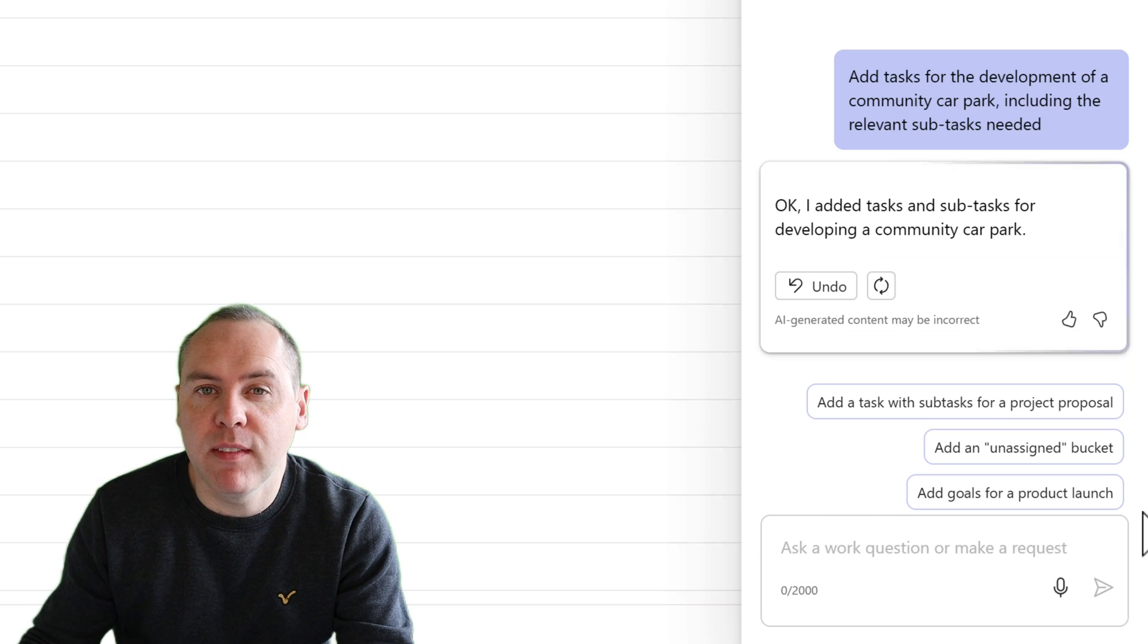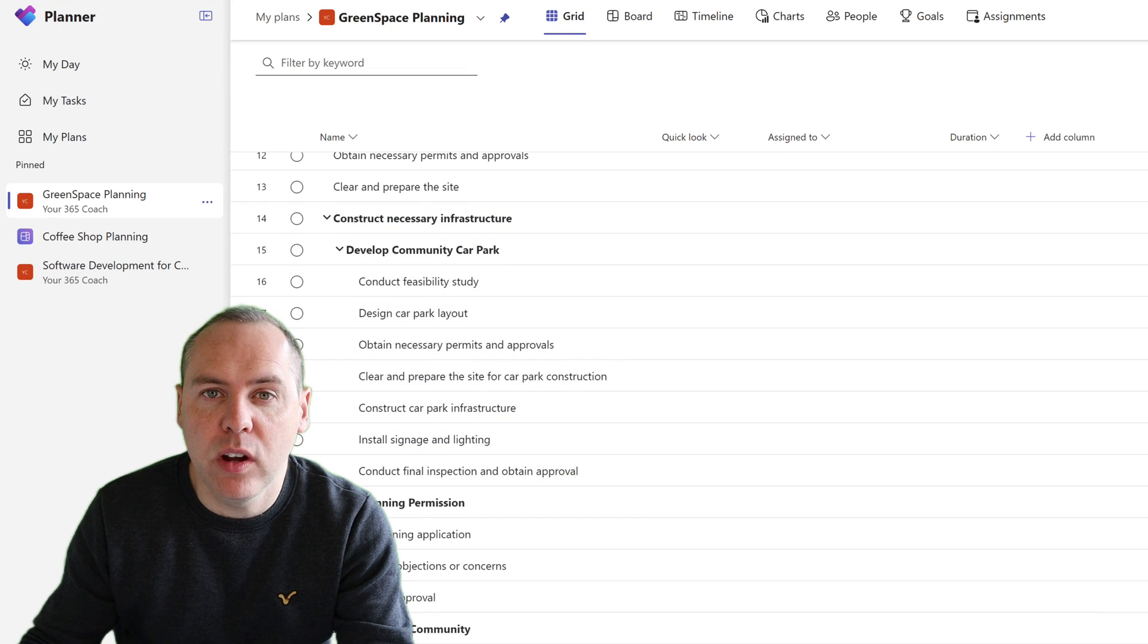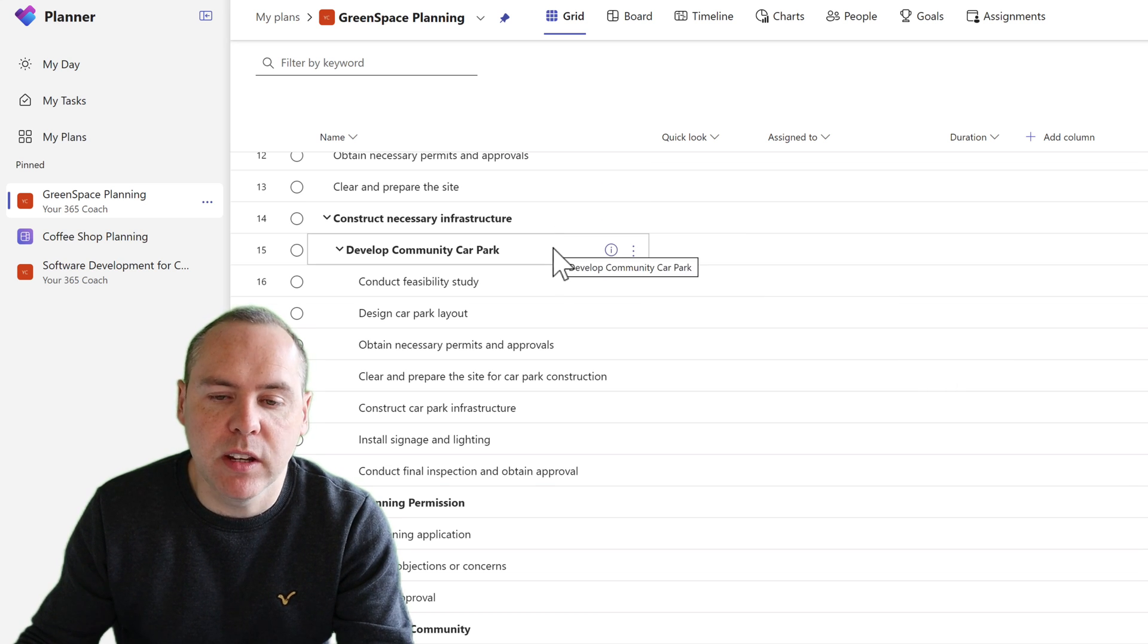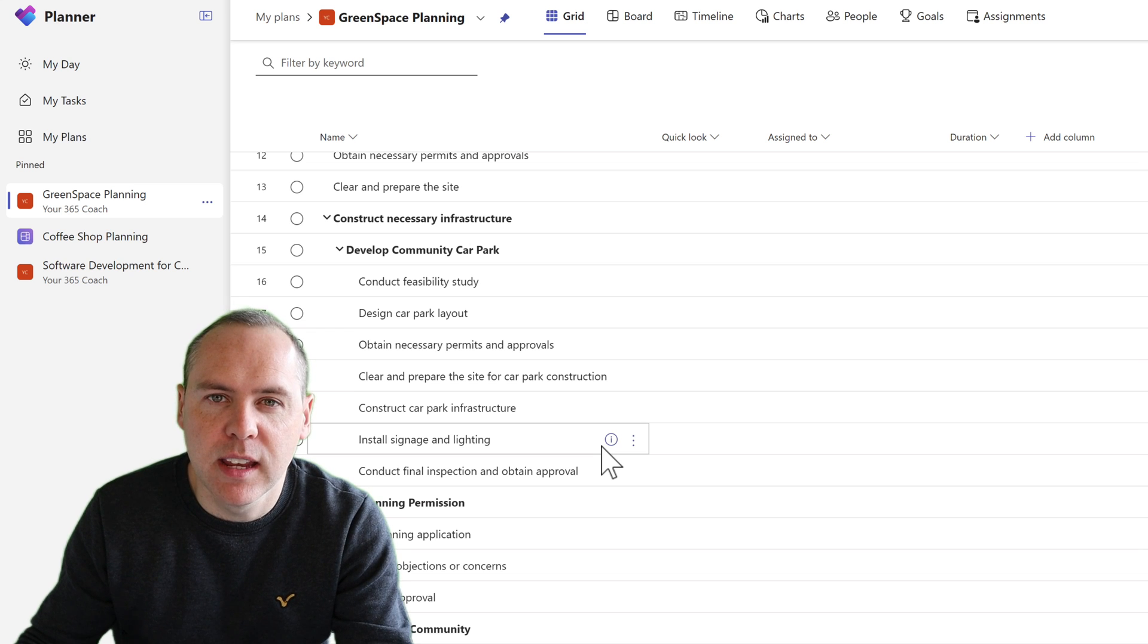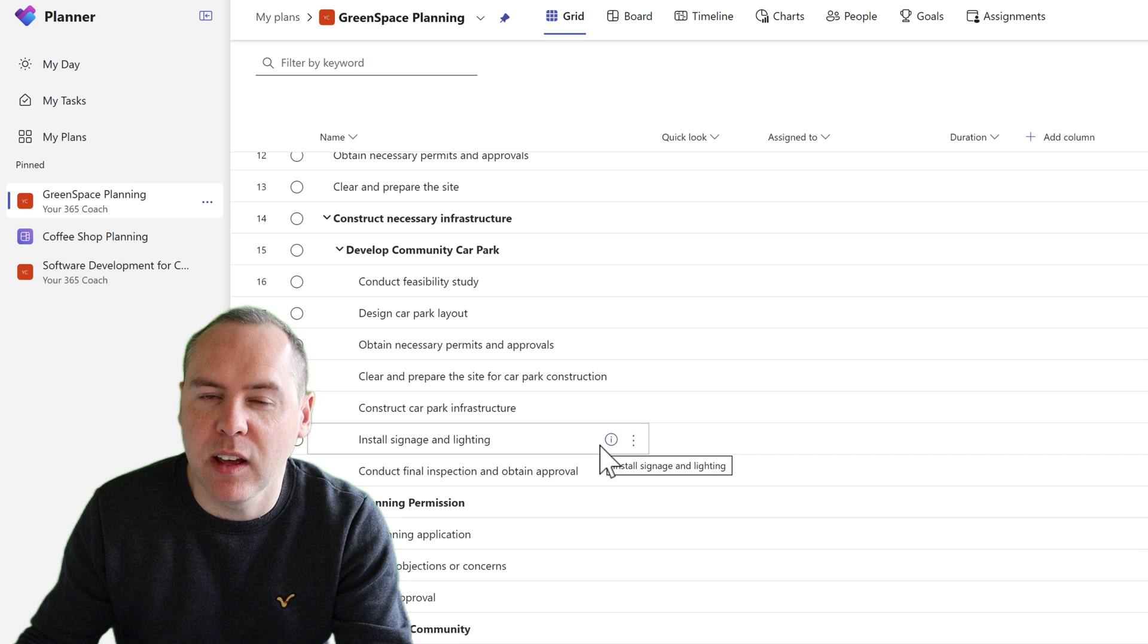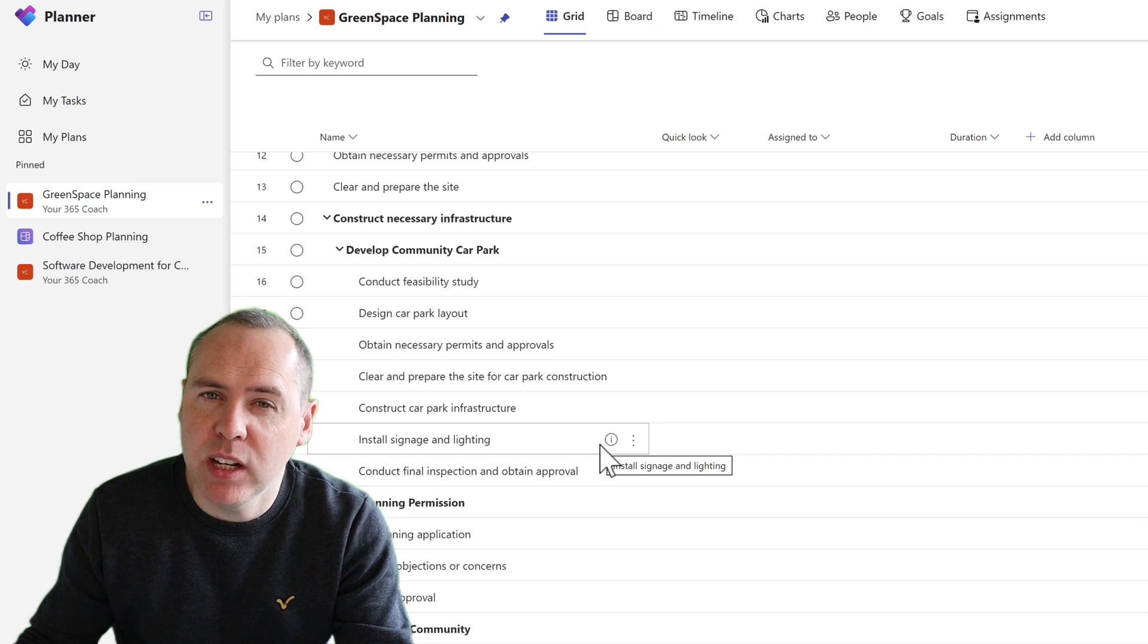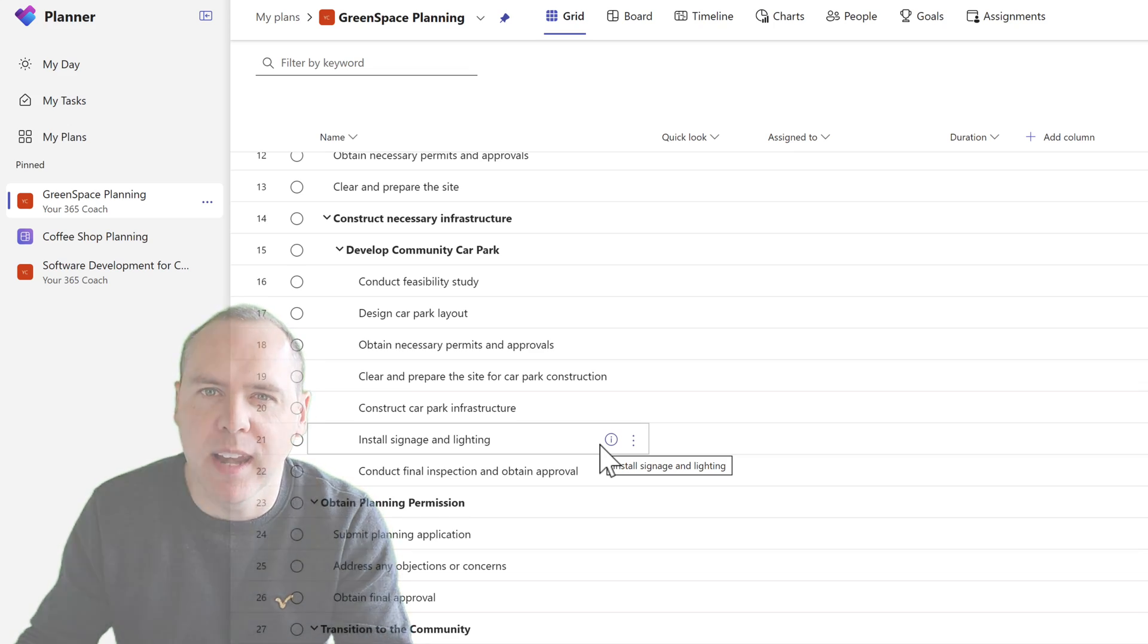So as we can see, I've asked Copilot to generate those additional tasks. We can also see them actually be inserted live inside of our plan. We can now see a new area of construct necessary infrastructure, develop the community car park with all of those elements underneath. I never told Copilot the specifics so it's worked that out and inserted those relevant tasks. So we're now seeing a plan being generated by Copilot for us and all the additional tasks that I haven't even provided detail on being added into our plan. That may have taken me an hour or so to complete myself. I've actually completed that in less than five minutes. So that's a valuable use case of the new Copilot experience in Planner.